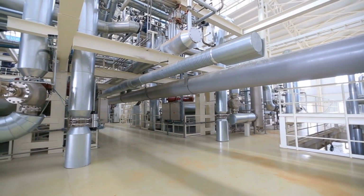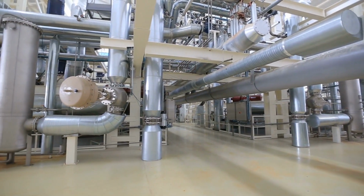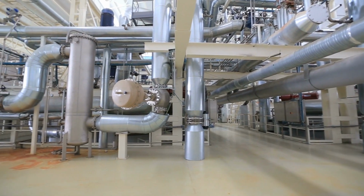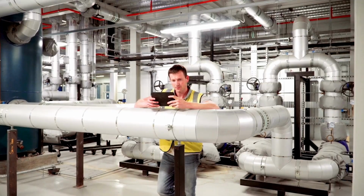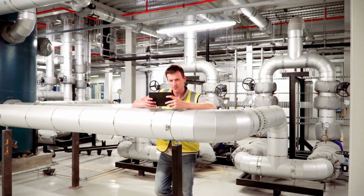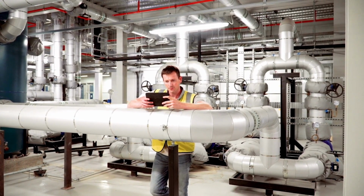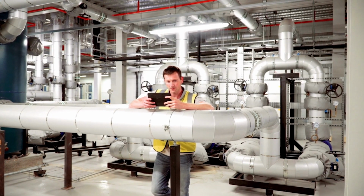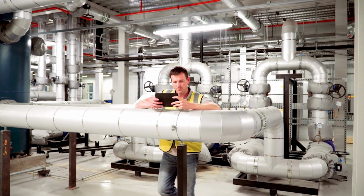Everybody's definition of done or ready means something different. For example, does ready mean that the piping is installed, that it has been flushed and cleaned, or that all QA/QC paperwork is complete and has been signed? Mechanical completions are not clearly defined. Assumptions are made for what is required for pre-commissioning and assumed who will do it. Pipe flushing may be required, but is it defined as a responsibility of the installer, the pre-commissioning team, a third-party cleaning agency? The transition from construction to commissioning is not clearly defined.